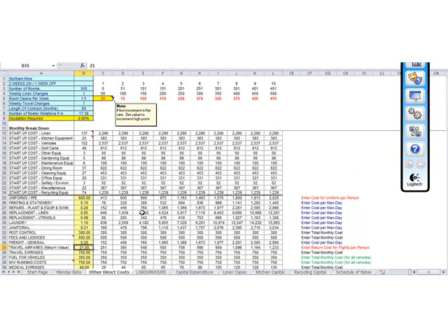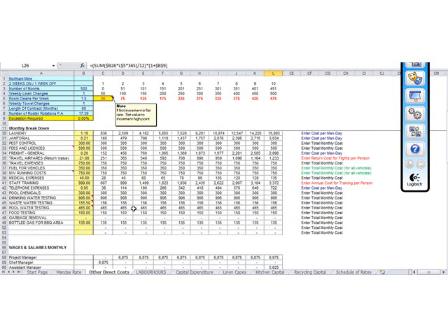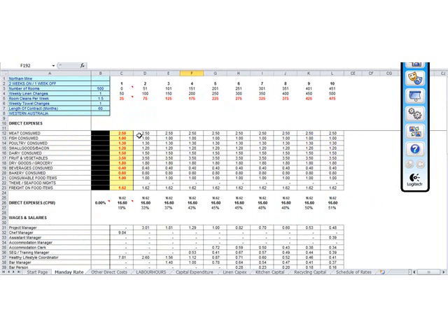If we have a look at other direct costs, again, this is a little bit of trial and error. You're entering data in and just seeing how it might spread out. Here this group has figured per day would be something like $600 worth of uniforms, 10 cents worth of printing, which means if there was 500 people on site, it's only going to be $14.45 in terms of a monthly expense. This sort of trial and error is what you use to fill in all of these bits and pieces, and hopefully based on the experience of the ops manager or someone in your team. So then we go up to the Manday rate.